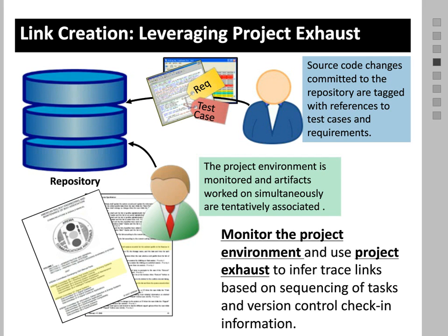When source code changes are committed to the repository, if we tag the commit with references to test cases and requirements, then we capture the fact that this code is related to this requirement and to this test case. And for very little effort, we actually establish traceability. So if we were to start such practices in our projects, then we would have the traceability in place that we need to deliver the project intelligence that we are after.